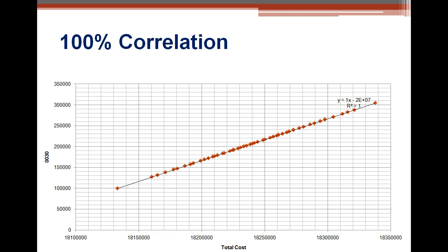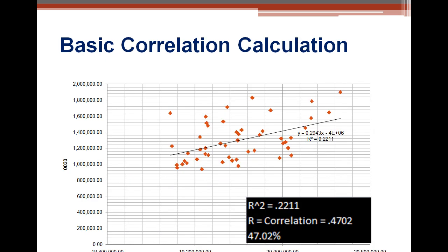So the next section, this is what 100% correlation would look like. $1 for $1. There's no risk anywhere except for structural steel and painting. When it goes up $1, the project goes up $1. When it goes down $1, the project goes down $1. That's 100% correlation. If you call us, we can hand you a set of slides that may help you get these explained to people. So call us at our PRC offices and we'll gladly pass you some slide decks, because we really do want people to explain these correctly. So you can really see, based on that regression line, what that correlation metric means.